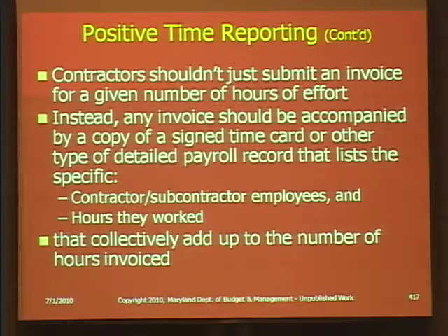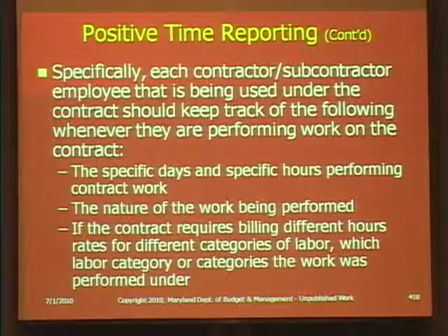And let me go to the next slide that will illustrate this. Let's see. Specifically, each contractor, subcontractor, employee that is being used under the contract should keep track of the following whenever they are performing work on the contract: the specific days, specific hours performing contract work.